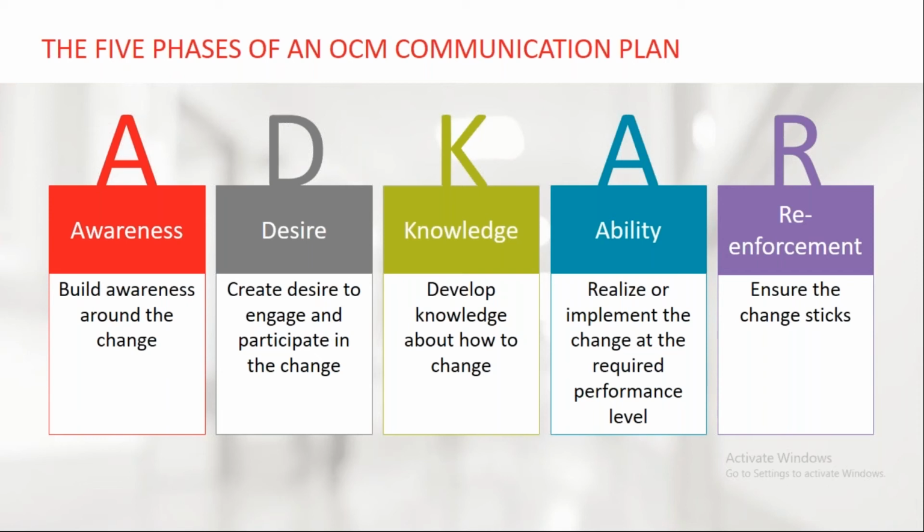Then you got to develop knowledge. Once they say they want the change, well, how do they get it? How do we implement it? And then we go through the ability phase, which relates to, okay, now that they have the knowledge, do they have the ability to use the new tool, let's say, or whatever? Or do they have the ability to adjust to the new change? And then there's reinforcement, which says, hey, we've made this change. We want to continue to reinforce it so you don't go back to your old behavior. Ensure the change sticks.